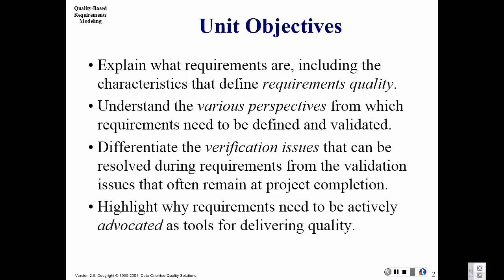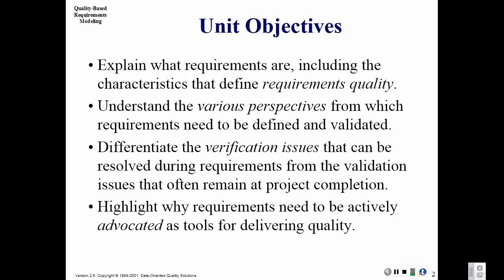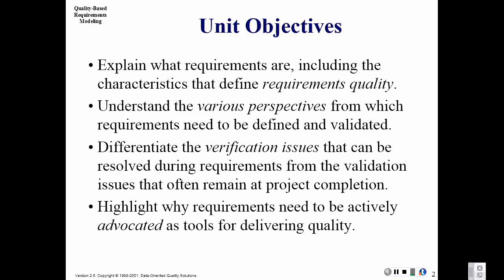We want to understand the various perspectives we use to verify and validate requirements. Verification asks: does the requirement statement meet the qualitative requirements placed on it? Is it precise, unambiguous, pure? Requirements verification makes sure our requirements are those things — it's a form of testing, review, and inspection. Requirements validation then asks: can I demonstrate that the requirements I've written, when satisfied, will in fact solve the problem I was assigned to solve? When the system is implemented, will it solve the problem I was told to solve? Those are the two V&V aspects we're looking at, done at different places in the project lifecycle.